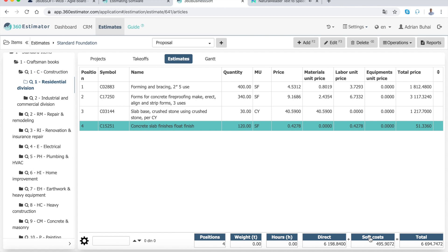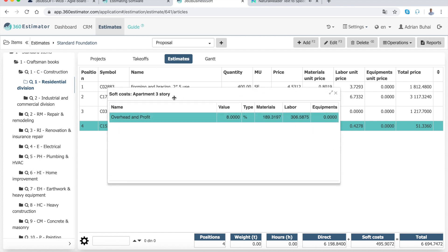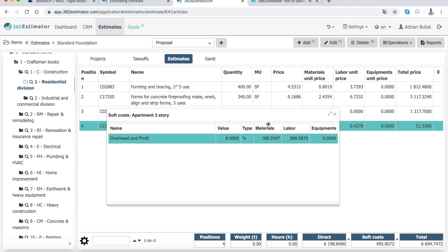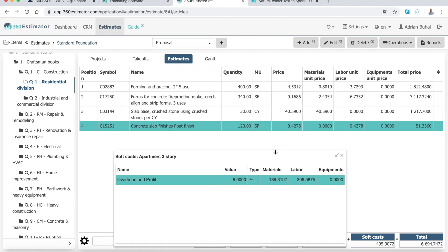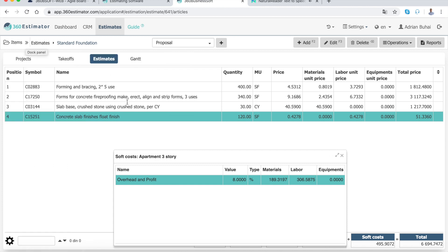Overheads are regular expenses that are not directly related to specific construction jobs, such as office expenses, bills, bookkeeping, accounting, taxes, legal costs, and your insurance for independent contractors.